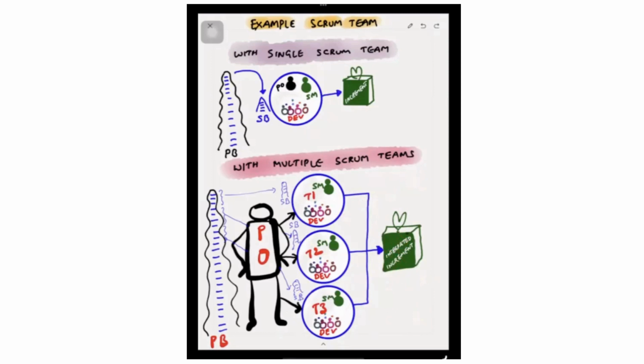Now coming to the estimation techniques. For example, imagine this team is going to use story point estimation, this team is going to use t-shirt sizing estimation, and this team is going to use man days or man hours estimation. This is not a wise thing, because the product owner has to give a forecast about how many more sprints they need to complete the remaining work.